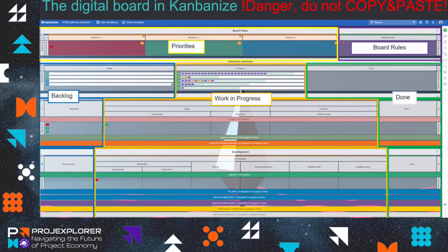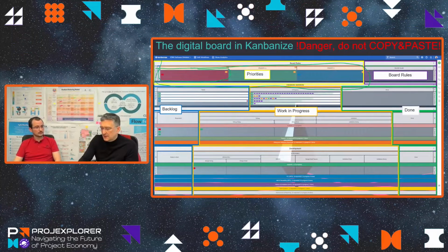As we can see here, this time priorities were very visible, and we locked the priorities so we can have only 3 priorities. One is more important than the second one, more important than the third one, and we don't have a fourth one. That was a very interesting design, because those are the cells for the priorities on the board, and there is a width limit for them that is exactly 1. You cannot have more than 1 emergency, yeah?